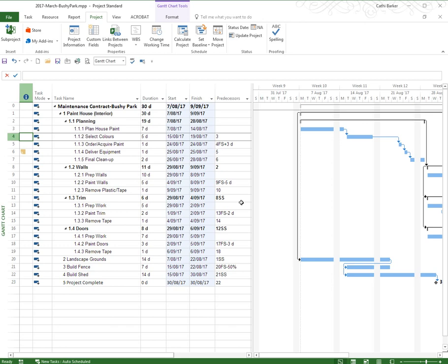So imagine the scenario we've been talking about off and on about a template. You would open up a template, you would save it as that client, but then you'd have to change the project start date. So you'd straight away go to the project tab in the ribbon and you click the Move Project button and you change the start date.